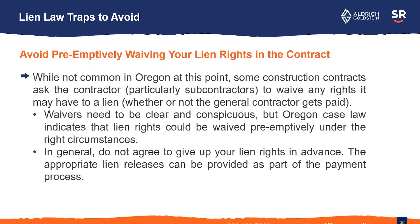Lien law traps to avoid: you don't want to waive your lien rights in the contract preemptively. Some states clearly allow it, and Oregon may allow you to kind of preemptively waive your lien rights — but I would definitely not recommend that. Don't give up your lien rights in advance. When the owner needs a lien waiver, you can do that to the extent of payment, and that should satisfy any owner or any lender. Liens can be a powerful tool to get paid and you don't want to give that up preemptively.